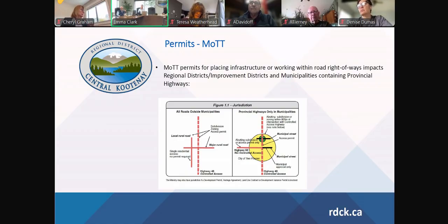But again, we may reach a head wall where we just move forward in agreement and get the access that we need. So we would defer that installation and inform the homeowner directly that, according to our bylaw, if it's not a grant funded installation, the meter still has to go in. And here's the estimated cost of that meter going in. That meter cost will be borne by you.